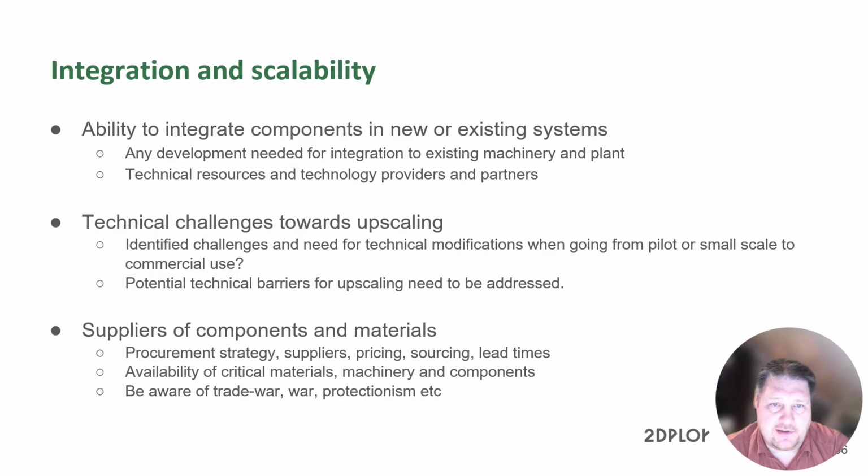I've seen projects where lead times, for instance, have been significantly changed during the execution of a project, and that leads to either significant cost increase, change in design, or delays in the projects.